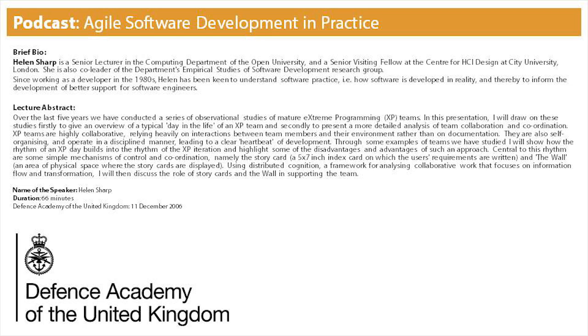So at any one point, you could look at the wall and you could say, oh right, if we're halfway through week 1, that looks quite reasonable. That's okay, we've done some of the stuff, we've moved it down. If you're at the end of the iteration, that's a bit more of a problem. Something's gone wrong somewhere because you've still got all that stuff at the top of week 1 that's to be done. But the point is it's a very immediately accessible way of looking at progress and understanding what's going on and how people collaborate.